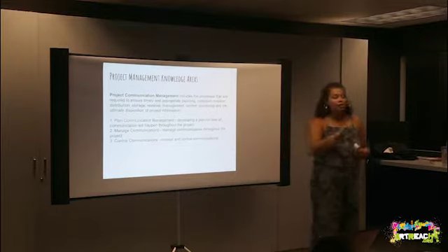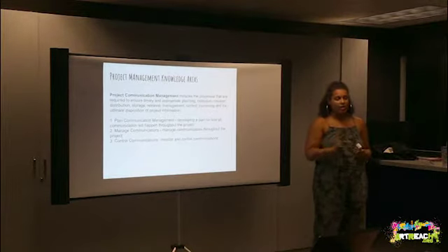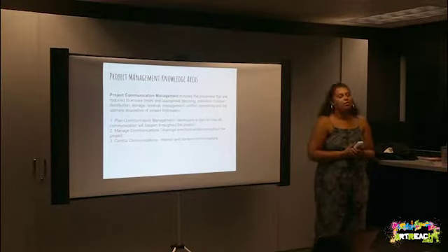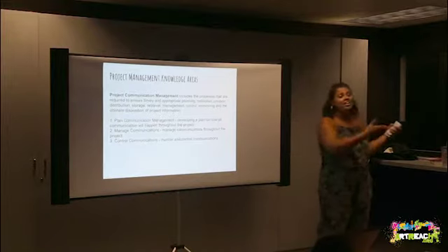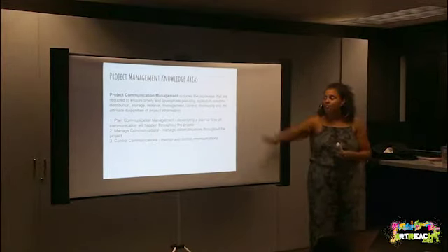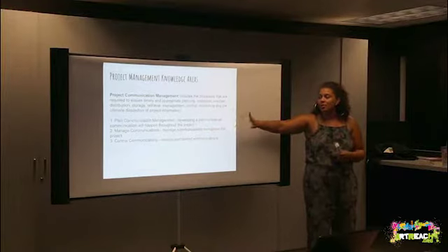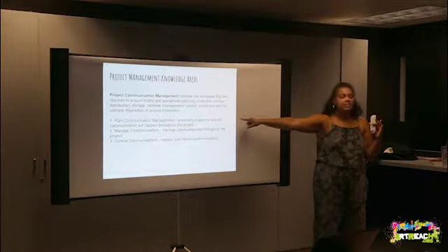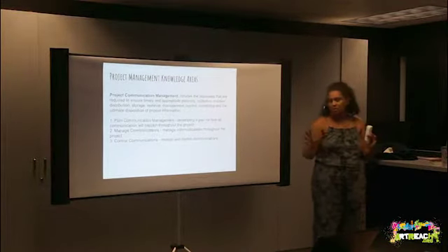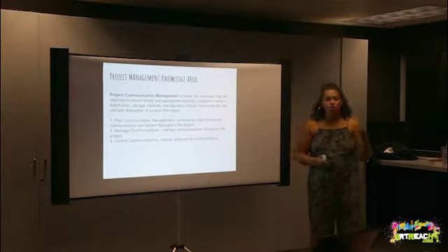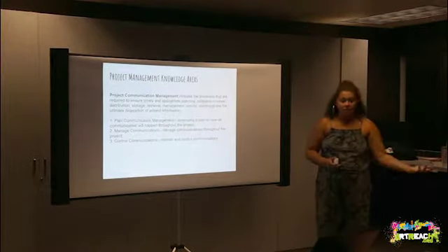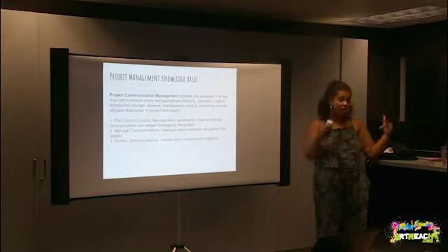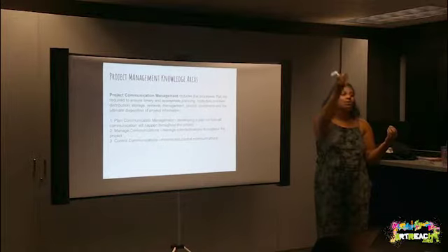Developing a plan for how all the communication in your project is going to happen. So if somebody's communicating in a way that's not in that plan, sorry, bro, what do you want me to do? You did not send the email, so this thing didn't get done. That's what causes the breakdown. Everybody in your camp knows exactly how things have to be communicated. Anybody new who comes on gets this, and so there's no breakdown in communications. No he said, she said, no broken telephone, no message lost. Because that's actually what kills your time and the schedule part. And then as you saw in the triangle, it affects the time, which means the cost goes up, the quality might go down.